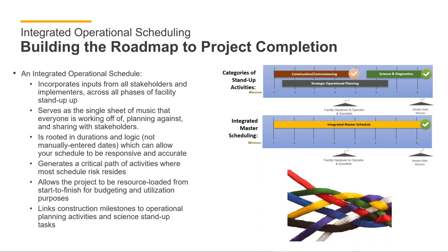An integrated operational schedule will reveal that your critical path is likely to bounce between different project phases and project domains. You might find your critical path starts in design, moves through construction, and then bounces between different project domains within operational planning and construction or science program stand-up, like IT, biorisk management, facilities, and security.